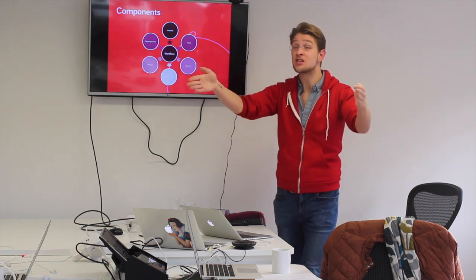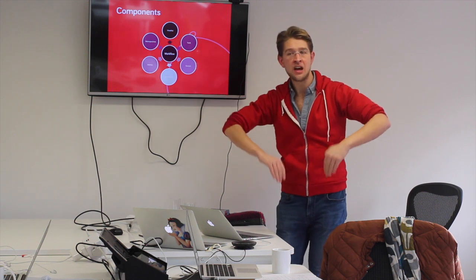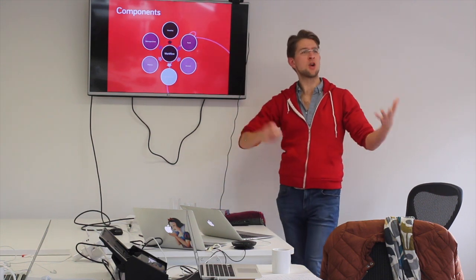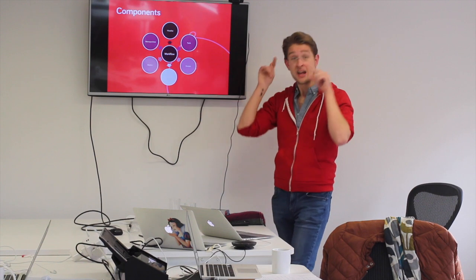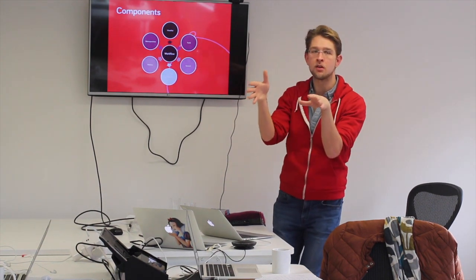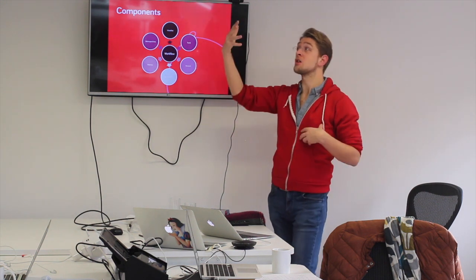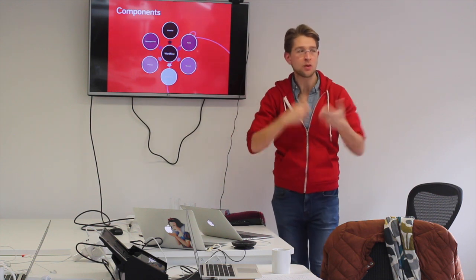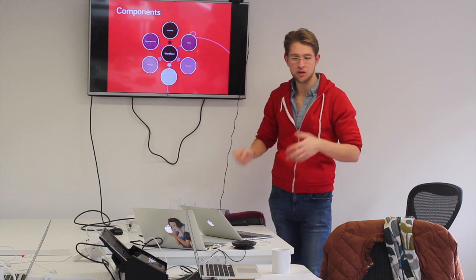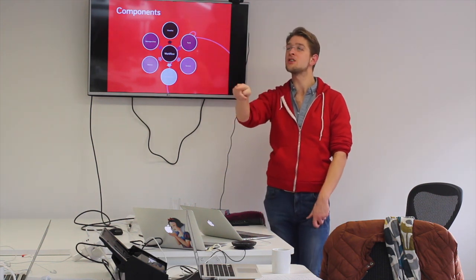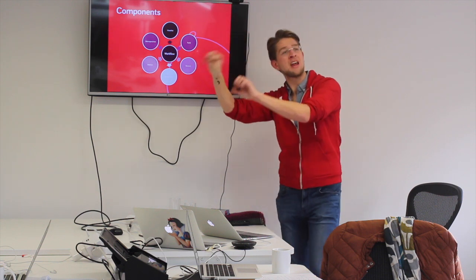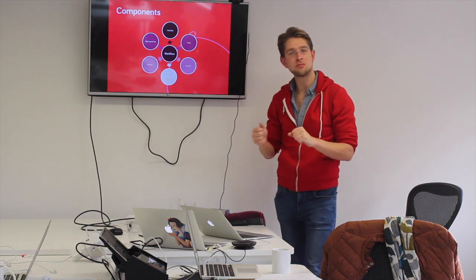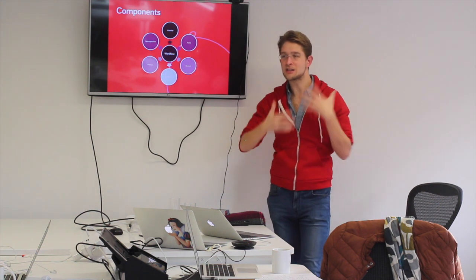And the reason for this is because the system is generally shadowed. We can't see it. So we say, I feel frustrated. It feels like people must not be pulling their weight because we're not doing the volume of work that we should do. That's the fundamental attribution bias. So saying, oh, the problem is people, and specifically other people, not working hard enough, rather than a system which might be introducing unnecessary friction such that people are putting in effort that's just spinning wheels because, for one reason, it's not clearly defined what the output from one stage that becomes the input of the next stage is. So there's this sort of fuzzy piece of work where some people finish the output at this point, others finish at that point, and then it creates, as Don says, this kind of systematically driven tension.